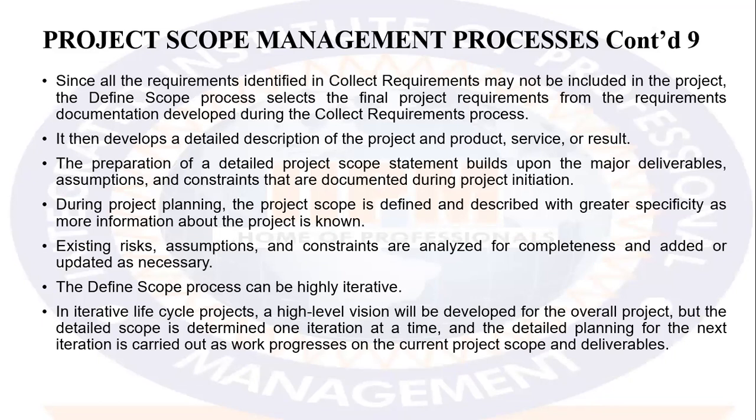Since all the requirements identified in collect requirements may not be included in the project, the define scope process selects the final project requirements from the requirement documentation developed during the collect requirements process. It then develops a detailed description of the project and product, service, or result.